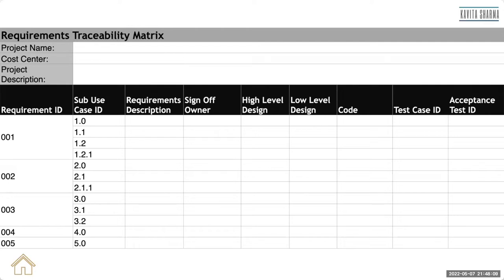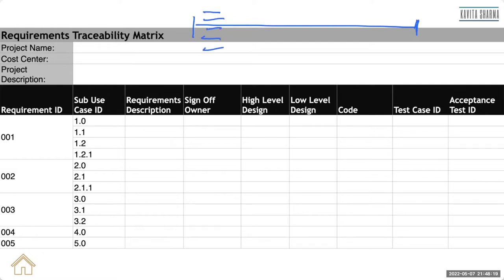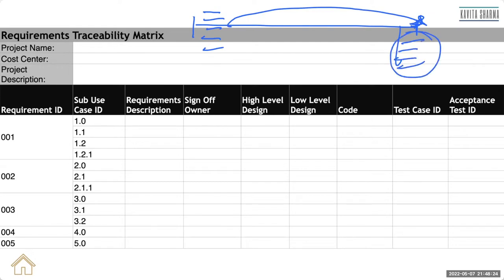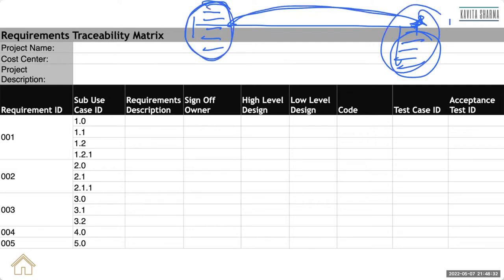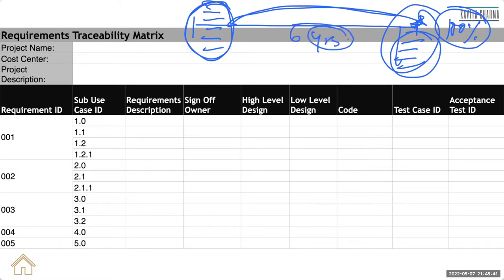The reason for that is because the projects are long, customer changes, people changes, project manager is changing. So there are a set of requirements. And by the time you get to the end, you end up giving some other requirement to the customer. The deliverables are something else. To ensure that you deliver all the requirements which were signed off, you delivered 100% of the requirements till you come to the closure of the project after six years or so, we use requirement traceability metrics.